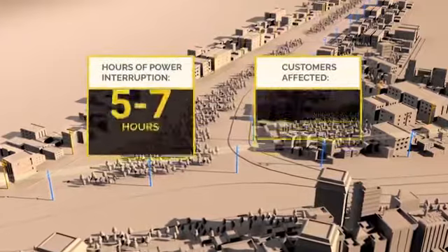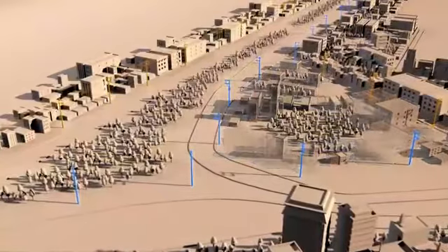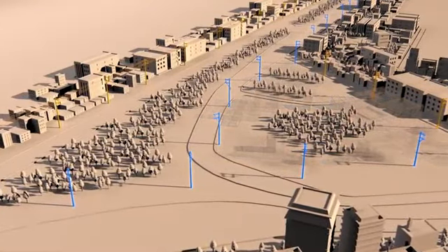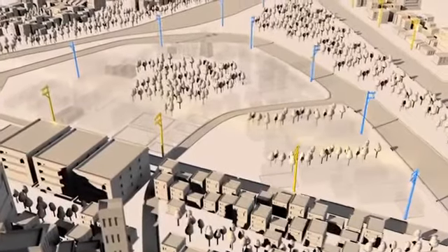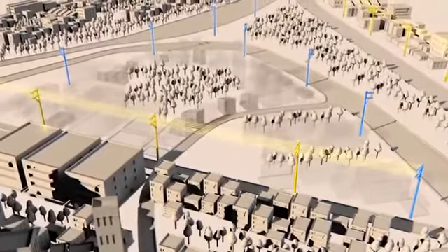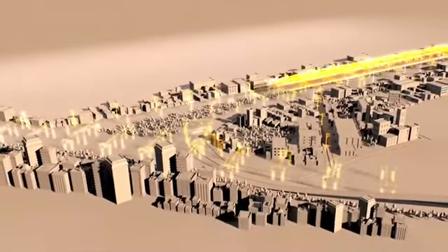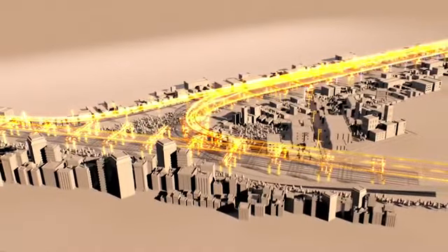Energizing the new lines requires a power interruption in the old power lines. The power interruption allows the new power lines to be connected and the old power lines to be safely cut and removed. Upon energization, power is restored to the affected areas and the old poles can now be removed. The pole relocation is now complete, and the project builder can now proceed with finishing the interchange.